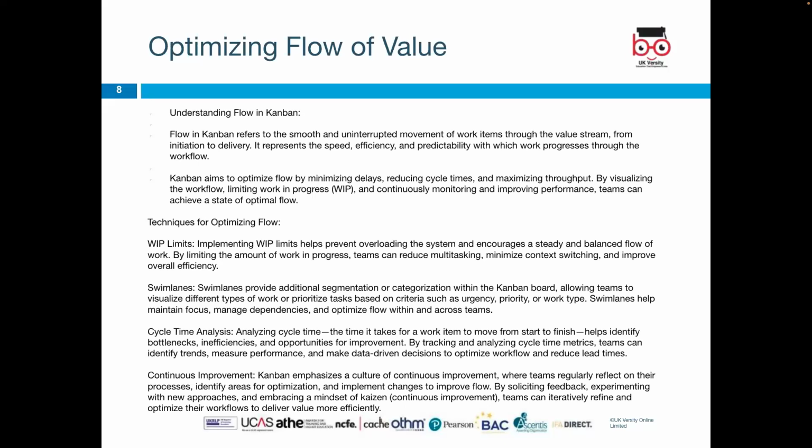Cycle time analysis: analyzing cycle time, the time it takes for a work item to move from start to finish. So obviously, that's what the cycle time is. This helps identify bottlenecks, inefficiencies, and opportunities for improvement. By tracking and analyzing cycle time metrics, teams can identify trends, measure performance, and make data-driven decisions. So obviously, you can measure if someone is doing what they're supposed to do or not, or if they're taking a long time on the task they've been given.